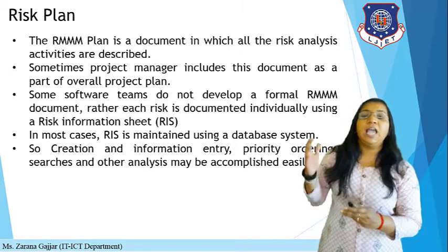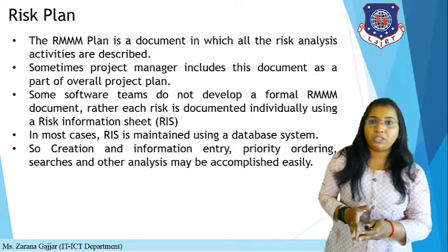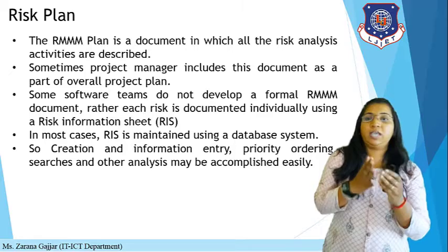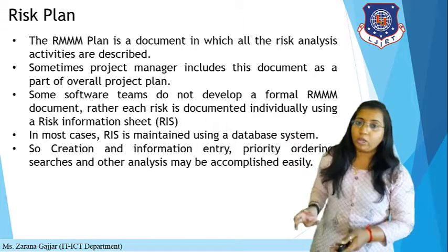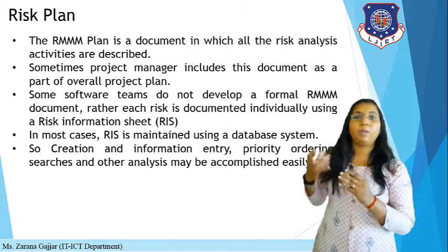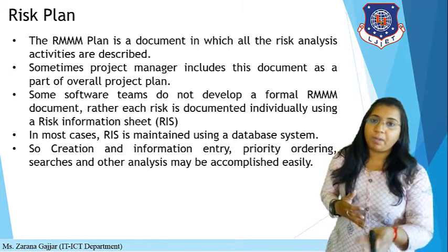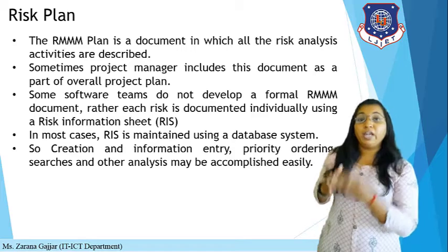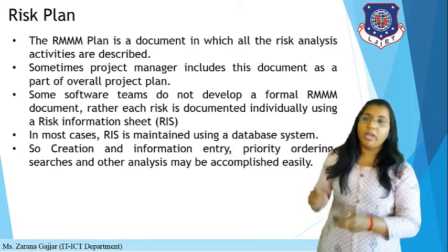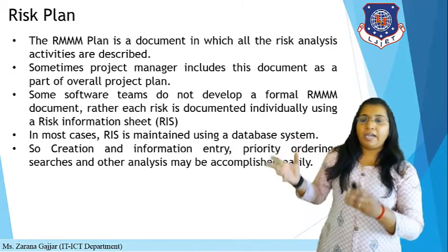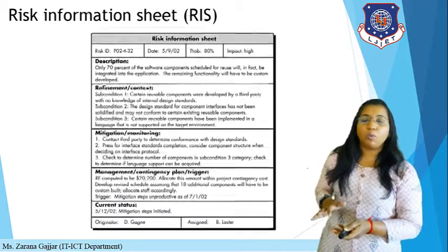In most cases the RIS is maintained using a database system. Creation and information entry, priority ordering, searches and other analysis may be accomplished easily by using this RIS. If the project manager does not develop a particular document for risk at the time of project planning, then a software team can individually use the RIS format, that is the risk information sheet. So RIS means they identify their own risks and put the risks into the RIS.